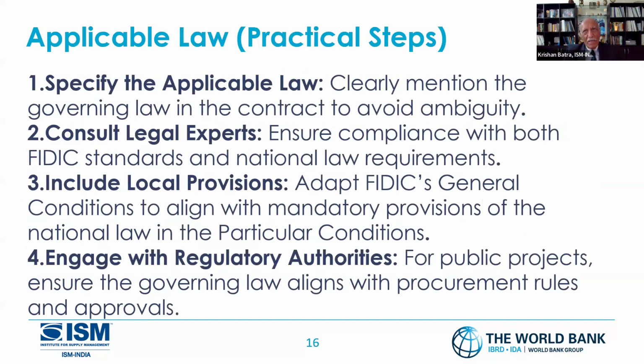Applicable law, one thing I will touch on, because for all of these contracts, one thing is very clear: what is the applicable law? If the project is in India, what is the applicable law? If the project is in another country, what is the applicable law? The vendor will like to force on you, you follow my law. So this is where I try to give you some practical steps. Clearly mention the governing law in the contract to avoid ambiguity, because in a contract we have to state all the time what is applicable.